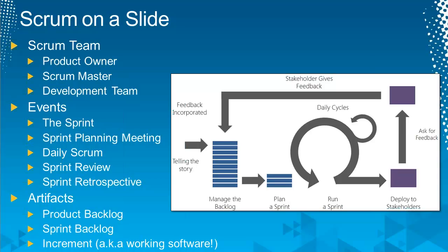Then the Scrum team, that's the product owner, Scrum Master, and the developers themselves, the development team, get together at a sprint planning meeting and see what they can commit to delivering from that backlog. It's the product owner's job to keep the backlog prioritized. The team can help with understanding the cost, the effort involved in delivering some of these features.